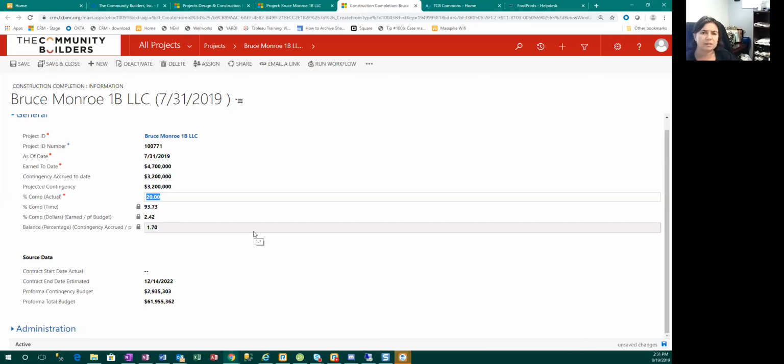But shouldn't the earned to date be from the pay application? That's what we're paying them, and there's a box, right? Exactly. But then the contract value changes by adding change orders, and the change orders are usually paid from the contingency, right? That's correct.